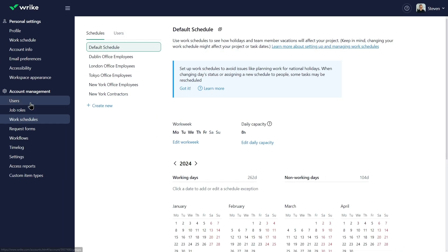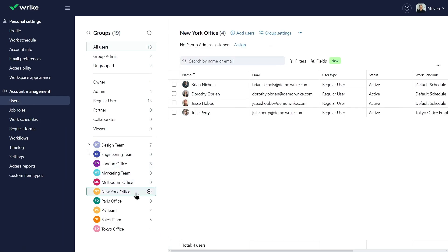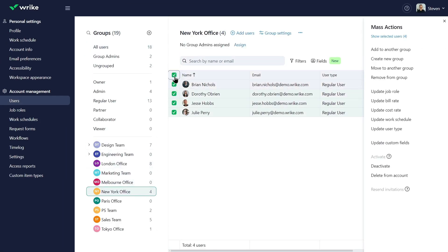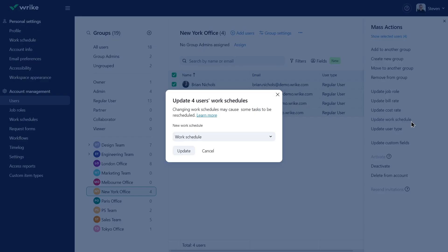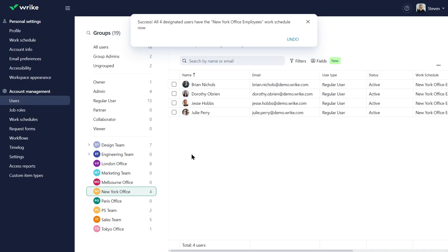Work schedules must be assigned to users. Changing a work schedule may affect task and project timelines, as these automatically reschedule to avoid conflicts with non-working days.